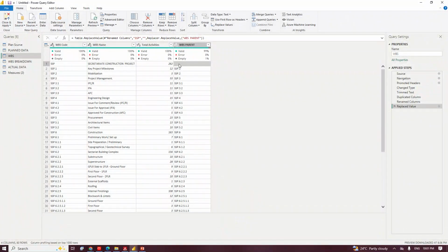Now, next thing is remember, if you can recall when you are creating pieces, when we are doing the Excel grouping, you find out that additional one group, if pieces is giving you level 3, in your Excel you'll be seeing level 4. If you are able to picture that, we'll do that here by removing the first level, because that first level is what PC is normally, what other programs normally use to add additional level to whatsoever that is coming out from PCs. So what I will do is I will use delimiter to remove some values.